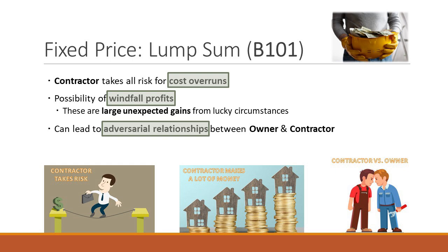This is a change that's out of my control, so I'm going to submit a change order. And then the owner says, well, I still have to pay for it because we haven't discussed that. I actually have that going on right now in a very specific project, because they're saying supply issues due to COVID are making the project more expensive. And I'm like, it's not my problem. You knew when they signed this contract in January. We were 10 and a half months into COVID when you signed this contract. Don't tell me that you didn't know that these could happen. So it creates an adversarial relationship because the contractor is bearing that risk.